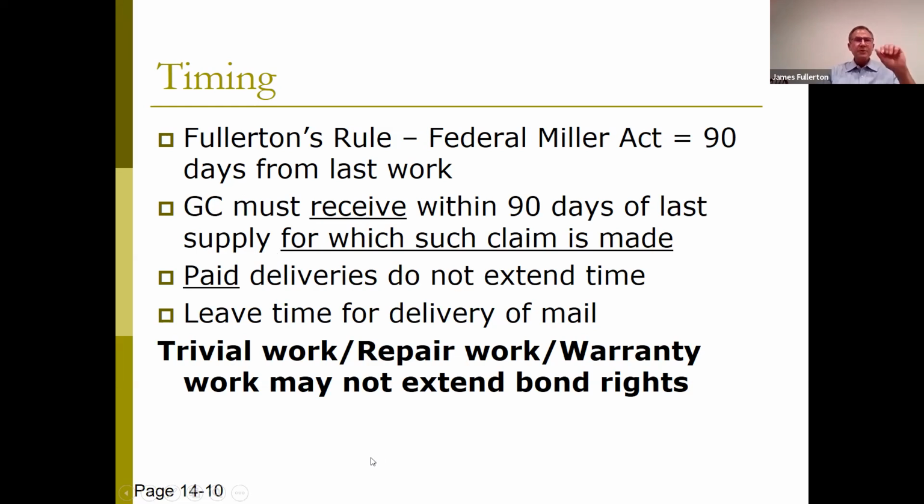This is getting a little lawyerish, but since we don't have a limit to time on these remote lectures, we can get into things in a little more detail. For which such claim is made, the significance of those words is that paid deliveries do not extend time to make a bond claim. And where this comes up is a supplier may refuse to provide any more credit on a project because the sub is not paying them in a timely manner.